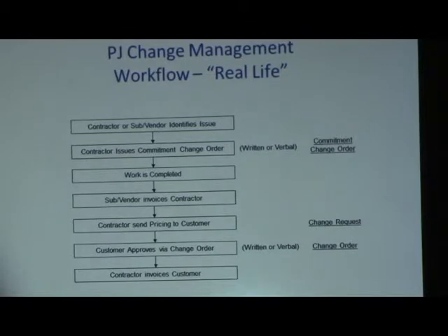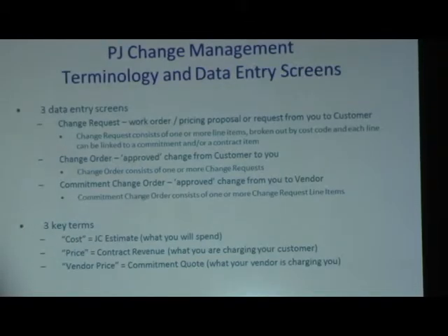Yeah, so the advantage of having the 3 different screens is you can do it in any order you need to. You can start with the commitment change order if you need to. You can start with the change request if you need to. You can proceed whether you have the change order or not. So it's all driven by your internal policy and the needs of the job. It's good practice that you not proceed with costs if the owner's not going to pay for it, but that's part of the project manager's job, and managing that relationship.